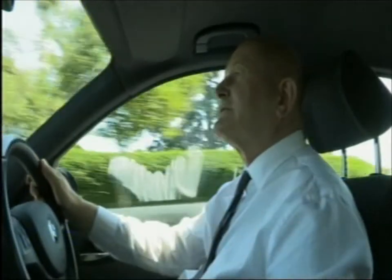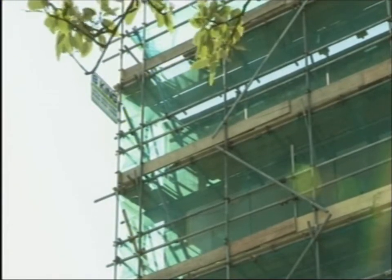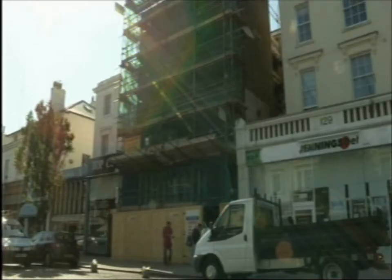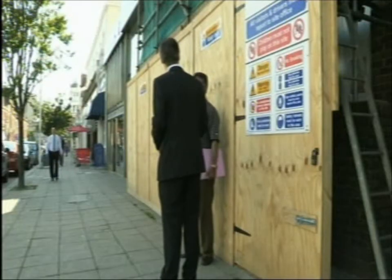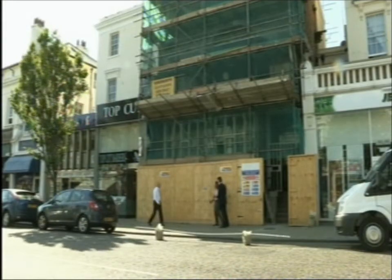The new owner has been granted a 5-year loan of £236,000 to be issued in stages. The loan is through Kent County Council's No Use Empty scheme. Today, Ian is meeting his colleague Steve Grimshaw and the developer Sirajul Islam to check the progress on site and hopefully sign off the second stage of funding.